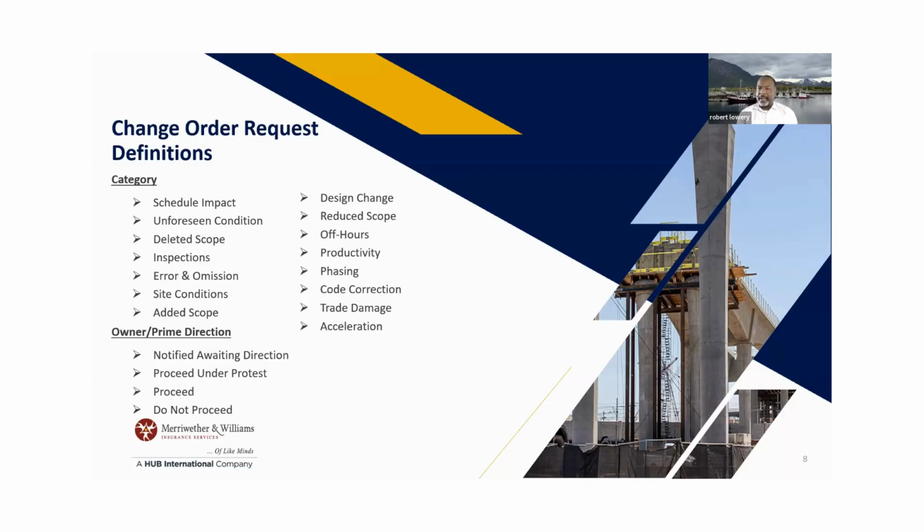What is my exact general conditions for each person? Your accountant, whoever's doing your engineering, whatever it is, know exactly what it is, because that is where your insurance and the bond come in. On public works, your bond premium is going to go up every time your contract goes up. Same thing with insurance. That premium goes up a percentage, maybe 2%, whatever it is. But you need to know what those costs are so you can apply that money evenly on those change orders.